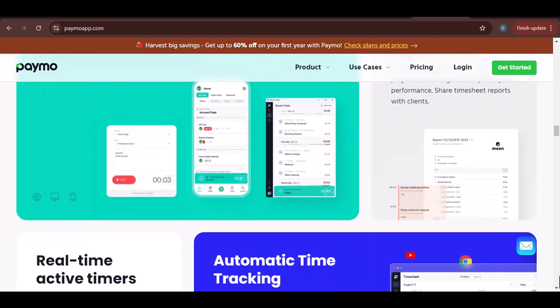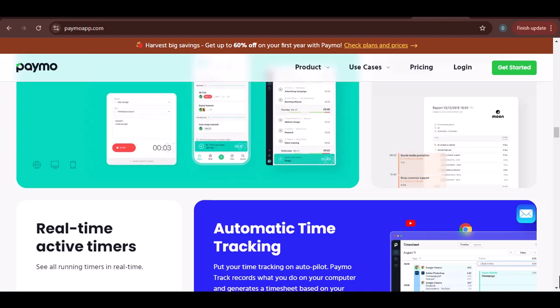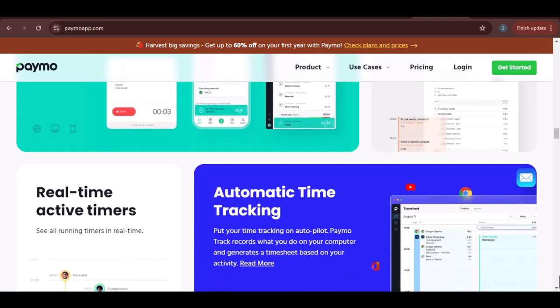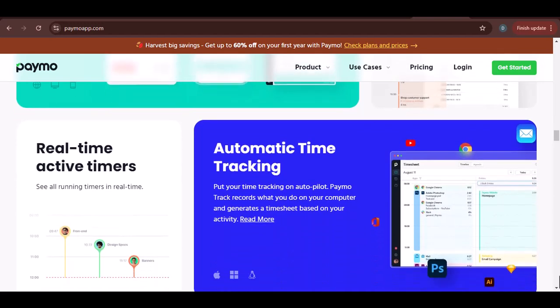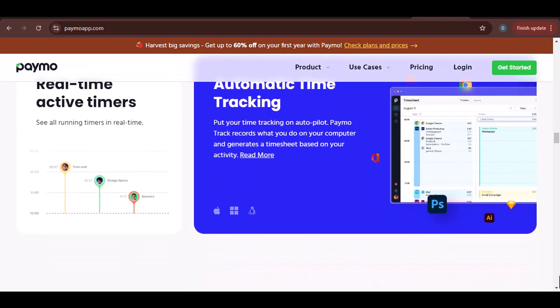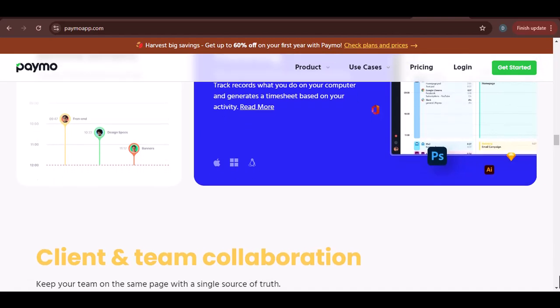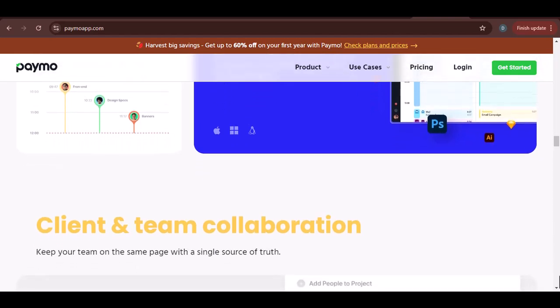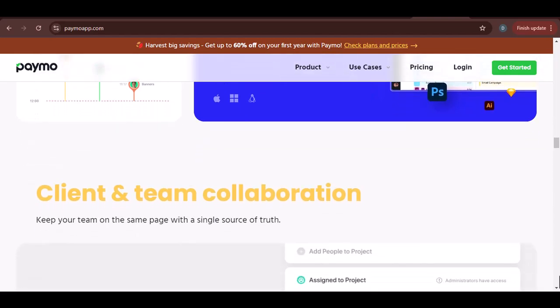Due date. Set a deadline for the task. Assignee. Assign the task to a team member. Priority. Indicate the task's importance, e.g., high, medium, low. You can also create subtasks within a main task to further break down the workload.